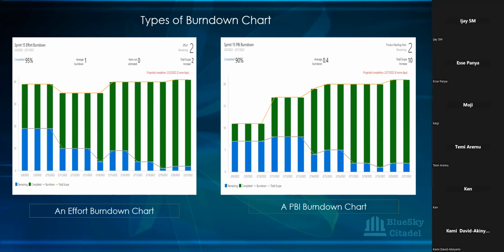That's why you have to check and do gentle nudging. You notice that the stories are completed and sitting in UAT, so you check with your BA to say there are stories waiting for them, because they might not know it's there. Once they finish and put it in UAT done, you check that all the tasks on it are completed, and then you move it to done.